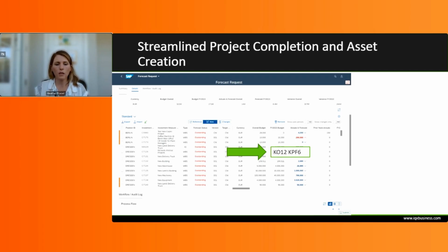With the forecasting, there is an approval process that would also be followed, and there are multiple versions of the forecasting that could be done. So within this application, our client was able to do a working forecast where they had a version that would be maintained by the plant managers, and then it would be sent for approval and adoption. Upon approval, it would move into a version that was for the month, and then at final adoption, where no more changes could be made and that was your final forecast for the month for that version, it would be moved into a final version that was locked down.